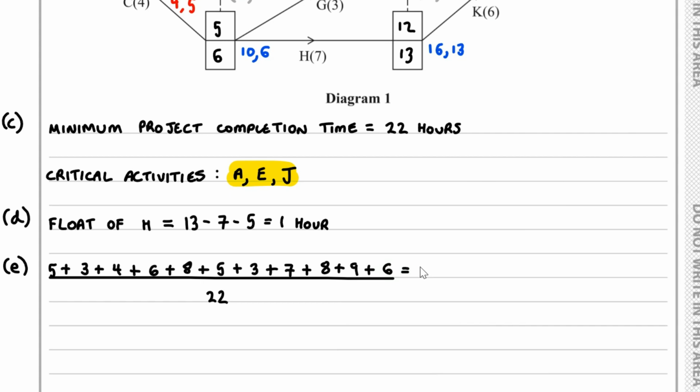So here we've got 2.909, etc. We have a lower bound of 3 workers. Of course, we need to always round up for the lower bound.